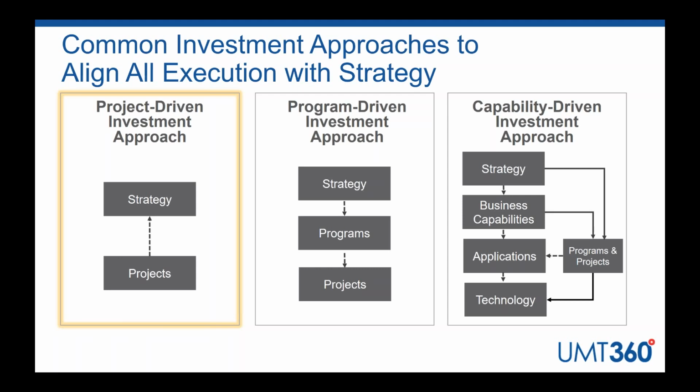It is a good technique, actually one that we introduced back into the market back in the early 2000s. However, the one frailty of this approach is it's more bottom-up than it is top-down, mainly because strategy is defined and prioritized in a silo, and then project demand is captured, disconnected from the strategy, and part of the business case involves mapping against strategy to select the best of whatever's teed up. So you're never quite sure, did you start with the right demand? You definitely know that you selected the best of whatever projects were teed up.